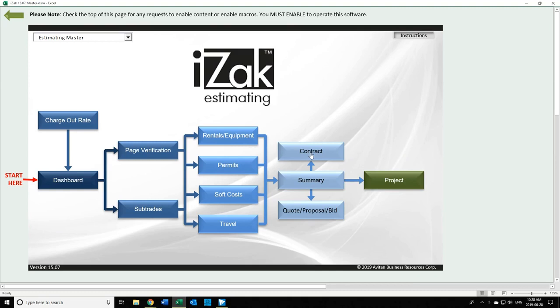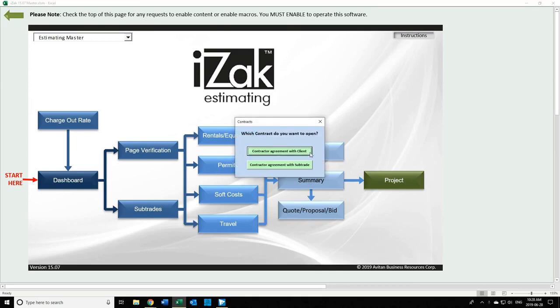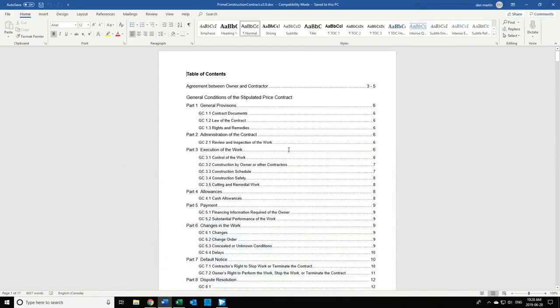For example, in Canada, the construction industry would use this agreement that I just opened as CCDC. They have different versions of CCDC document. There is a version that is a contract between the general contractor and the owner on stipulated price. There's a version that's time and material. There's a version of project management.